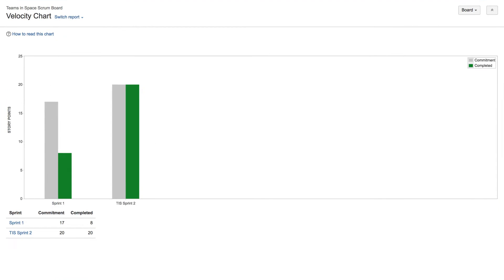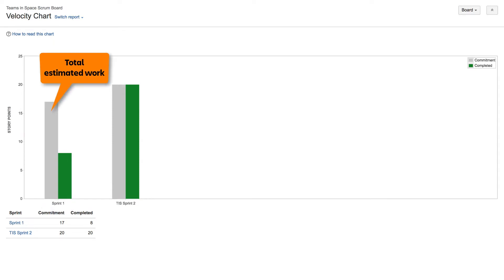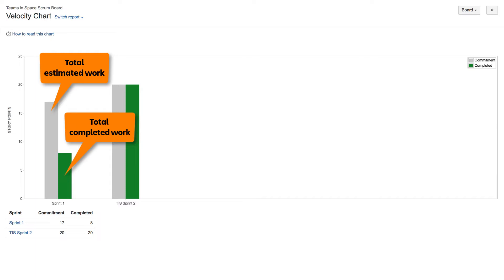The Velocity Chart displays up to seven of your most recently completed sprints. For each sprint, the gray bar represents total estimated work, and the green bar shows total completed work. Note that the Velocity Chart doesn't show the length of a sprint, just how many points were completed during the sprint.